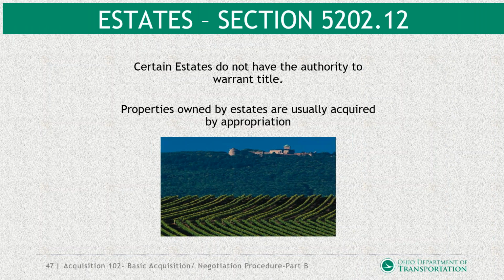All right, coming to the last section of the form, a lot of this portion of the form is completely AG driven. When you come across something like this, you're going to be seeking guidance and direction from the Attorney General's office. And this is when we're dealing with estates. This is where we're looking at estates that do not have the authority to warrant title. Our instruments talk about warranting title, but you may come across situations where they're not able to warrant title. If that's the case, that will probably require the parcel to be appropriated.